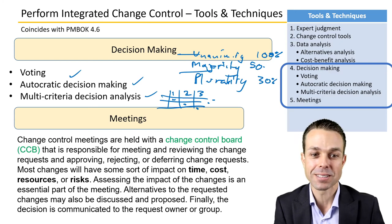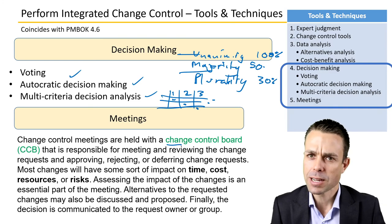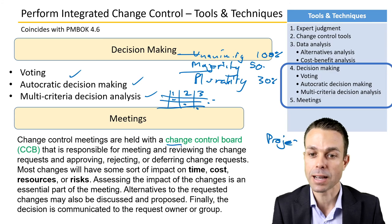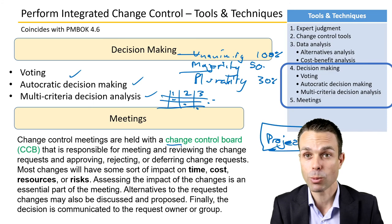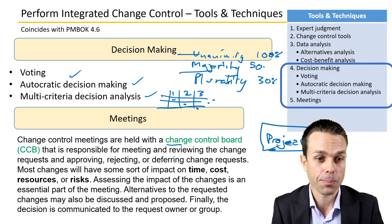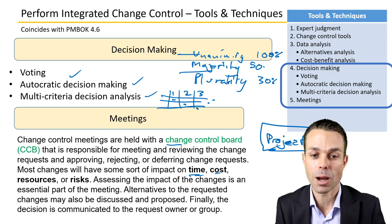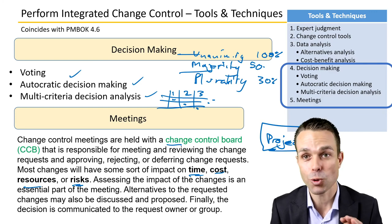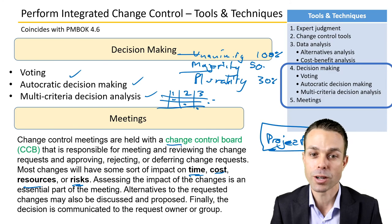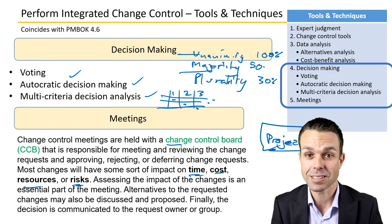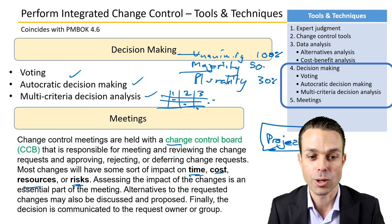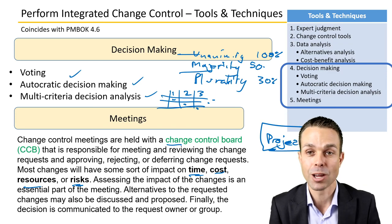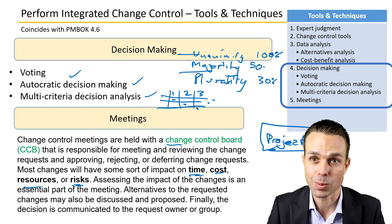Change control meetings are held with the change control board — or if there isn't one, the project sponsor or whoever is managing those changes, depending on what was agreed when initiating the project. Most changes will have some impact on time, cost, resources, or risks, so assessing the impact of those changes is an essential part of the meeting. Alternatives to the requested changes may also be discussed and proposed. Finally, the decision is communicated back to the request owner or group who requested that change.